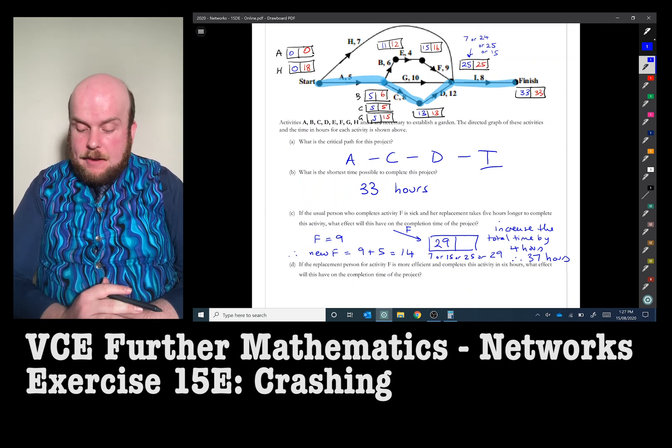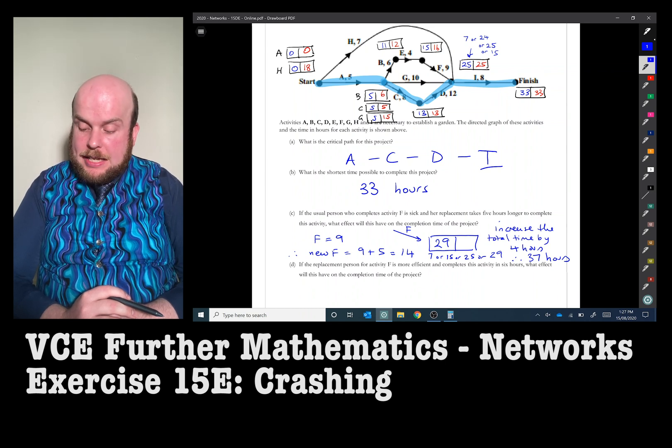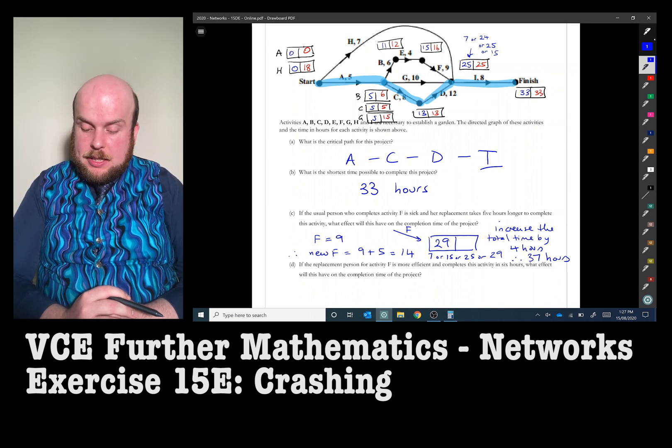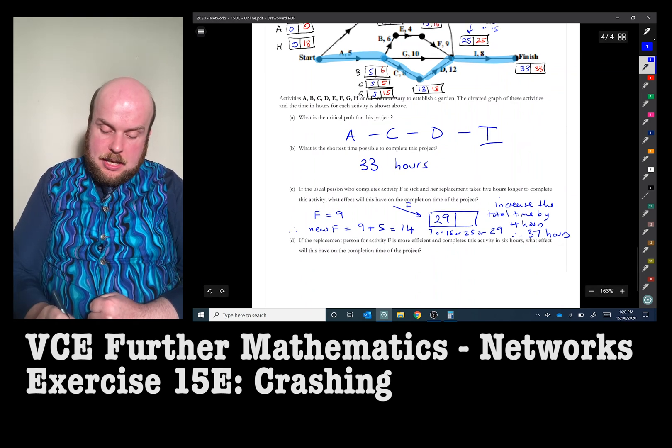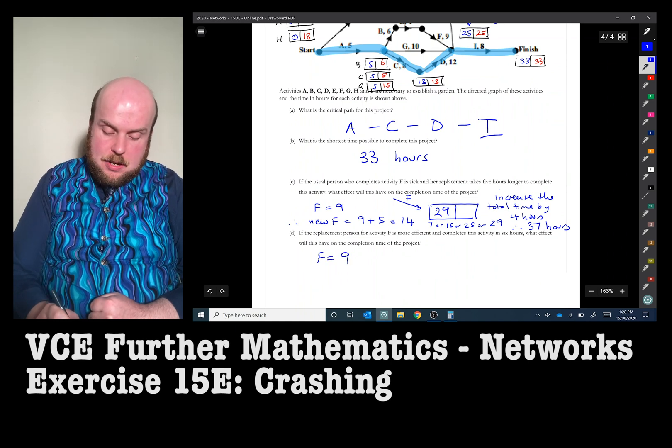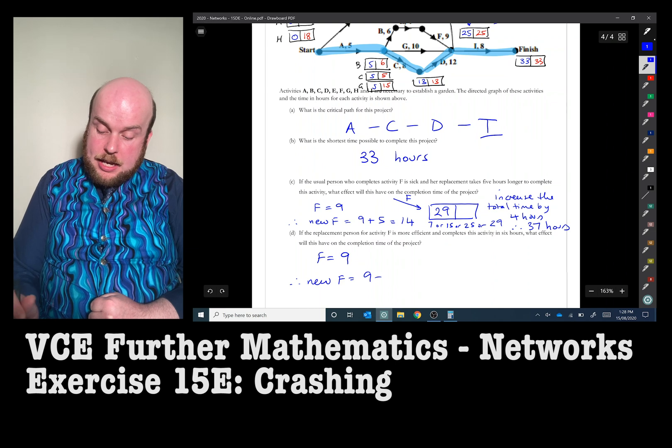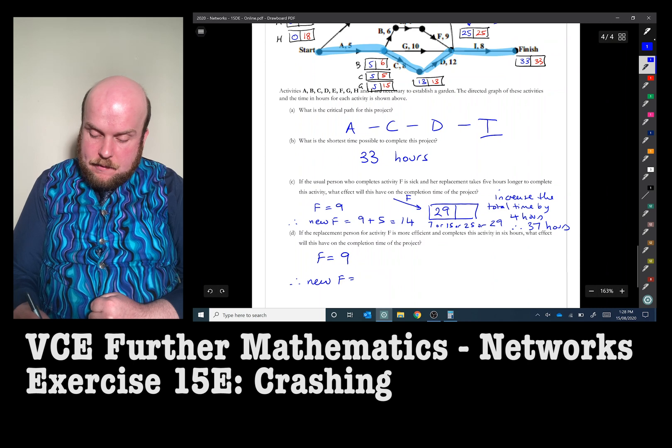Part D: If the replacement person for activity F is more efficient and completes the activity in six hours, what effect will this have on the completion time of the project? So the initial one for F was nine. Therefore, the new F would be six. It's not six less hours, it's six.